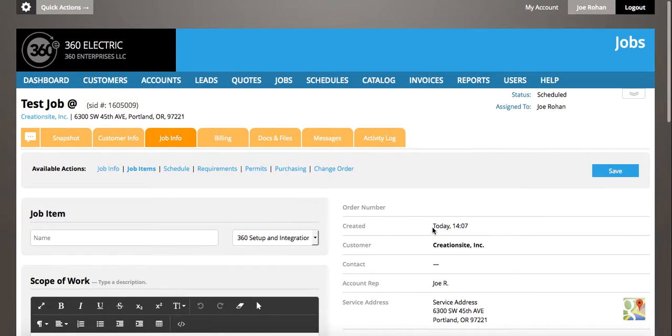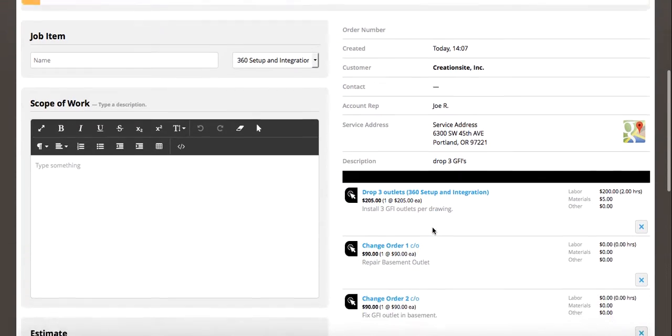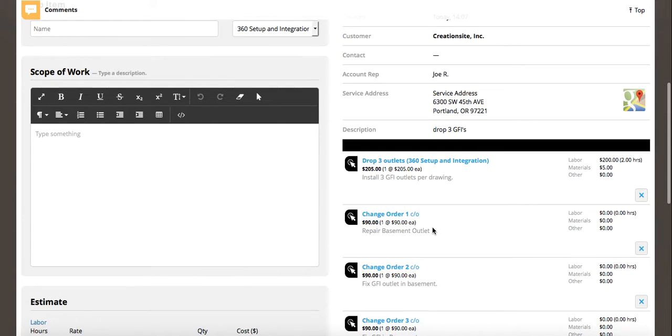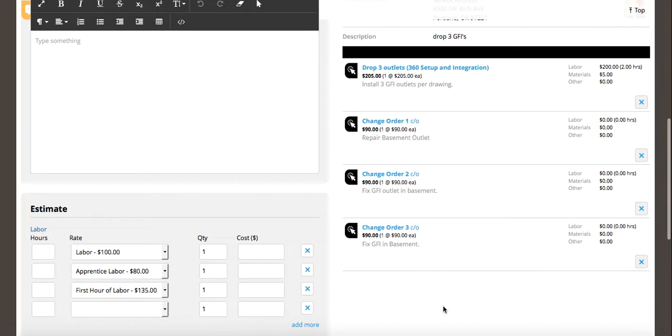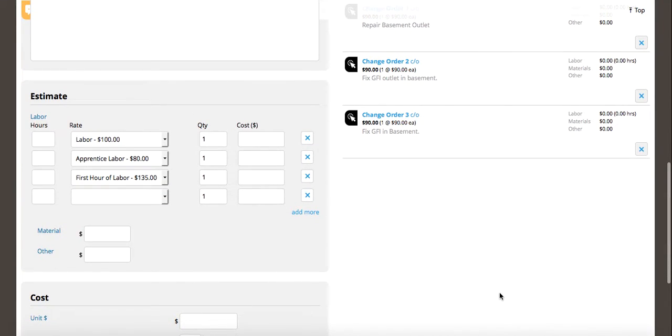Okay, so now I have created a change order, I've converted it into a job item, and I've gained approval, and I have it in the system. This way, the work gets tracked, all work gets billed to the customer, including any additional materials that I have to purchase to execute that change order. Obviously, you can use this for a much more substantial change order process where, if the scope of my work doubles, then I really want to paper document that and paper trail it and make sure that everything gets converted into the system. So this is the way of doing it.